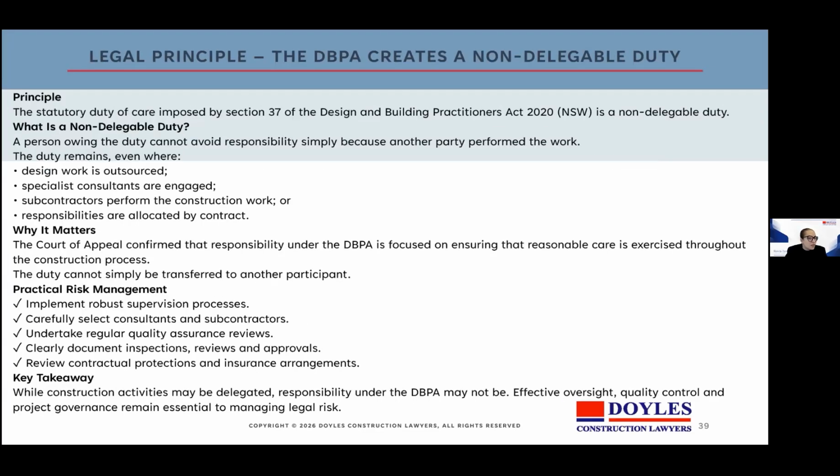The DBPA creates a non-delegable duty. The statutory duty of care, again, is non-delegable. Engaging competent consultants isn't a complete defence. The duty stays with you. The theme running through today is accountability at every stage. And Pathburn confirms one of the most significant features of the DBPA, that it's non-delegable. In practical terms, this means that engaging competent consultants and subcontractors is not by itself the complete answer to a defect claim.